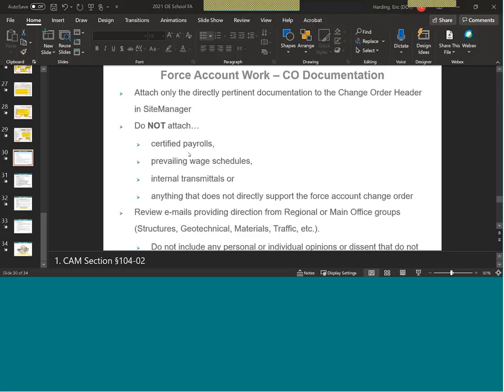I will address the latest question privately with the asker. Can the tack coat truck company be a service? Not if they are an approved subcontractor. And that's the real clincher here, folks. If you have a trucking company, a tack coat company, etc., approved as an approved subcontractor, they are then bound for force account work to provide labor, materials, equipment, and insurance breakdowns. They cannot be included as a service if they are elsewhere on the contract as an approved subcontractor.